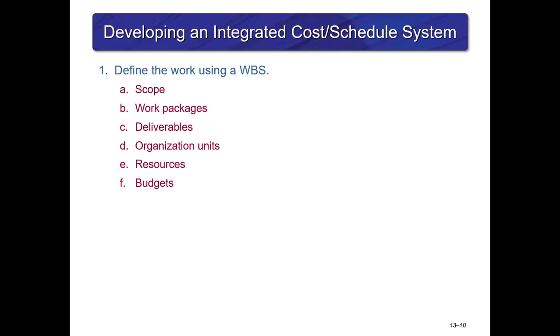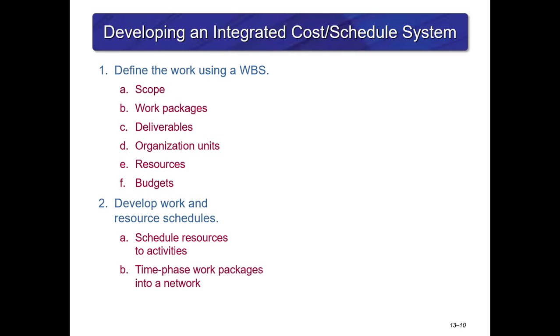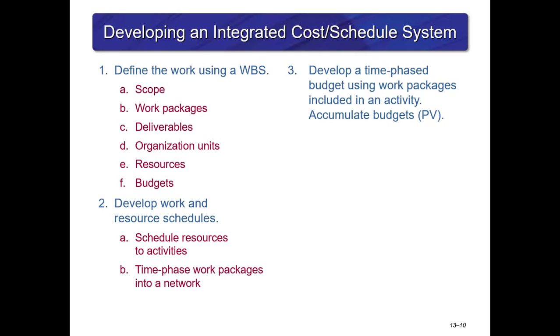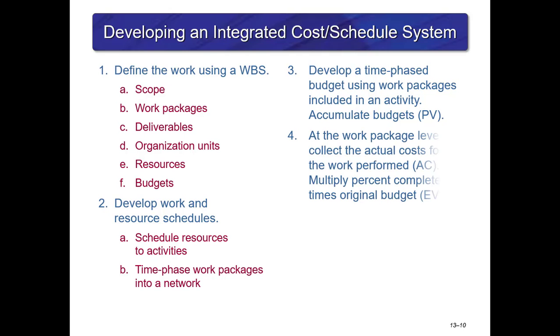Developing an integrated cost schedule system involves first defining the work using the WBS, the work breakdown structure, which you did in your project and also other assignments. Second, develop work and resource schedule, which you also did in your project and other assignments. Next, develop the time-phased budget using work packages, which you added to Microsoft Project in your project. And then at the work package level, collect the actual costs for the work performed.